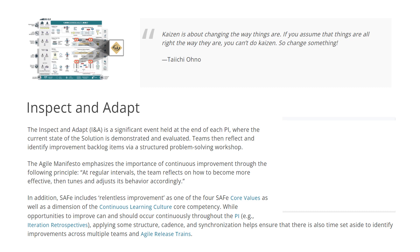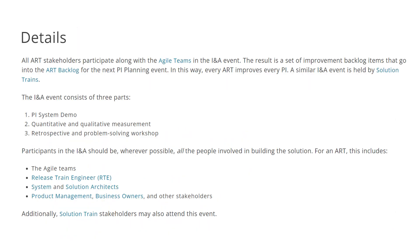While opportunities to improve can and should occur continuously throughout the PI — for example, iteration retrospectives, applying kanbans and synchronization — this helps ensure that there is also time set aside to identify improvements across multiple teams and agile release trains. All ART stakeholders participate along with the agile teams in the I&A event. The result is a set of improvement backlog items that go into the ART backlog for the next PI planning event.